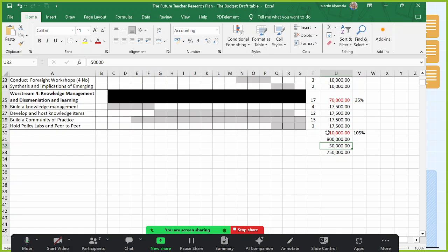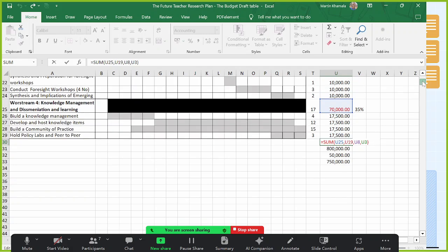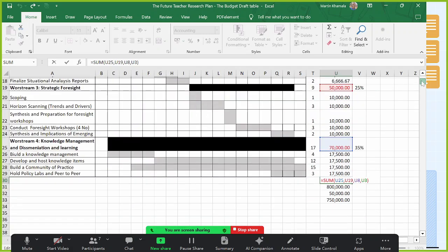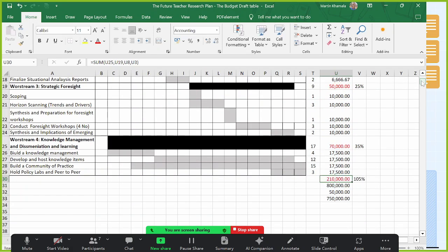I thought it was the administrative fee. It's not the administrative fee. I am saying that every organization has its own approval processes. If a budget reaches a certain amount, it goes to another level, to other people who do other risk analysis and such. So if we try to do it at 800, it will take like 1 month for the internal processes to approve. It's just because of the bureaucracies of organizations. But at 750, we can approve it at MSM.